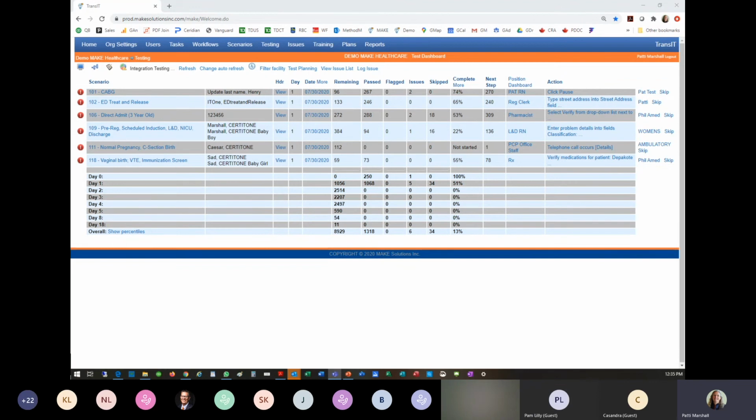So when you're getting ready to do your year-end price adjustments or whatever, you typically wouldn't put together a Microsoft project plan for that, but it's something where it touches a whole bunch of different teams. It usually touches lab and radiology and charge services. And so putting all the steps that they all need to do together into a plan, as well as doing your test script in TransIT, would make a lot of sense because it would all be in here. So the plan for the things that need to get done could be in here. And if Erin was waiting for the PathNet team to do their updates, then she could have a task for them in TransIT plans and they could mark when it's done so that she could better determine when she was ready for testing.